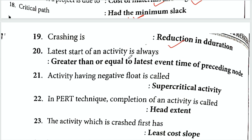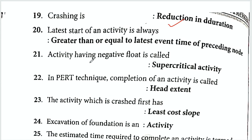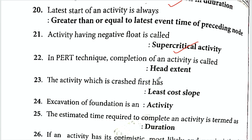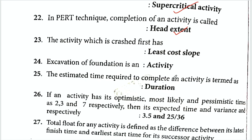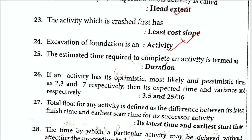The latest start of an activity is always greater than or equal to the latest event time of the preceding node. An activity having negative float is supercritical. The estimated time required to complete an activity is termed its duration.